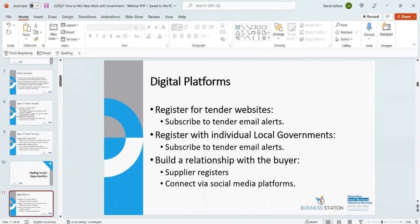Subscribe to tender email alerts, so you can plug in parameters for the types of tenders that you're interested in. If those come up, you'll receive an email advising you of that. Register with individual local governments if they're a market. There are portals for that, which I'll show you, and again, you'll be able to subscribe to tender email alerts.